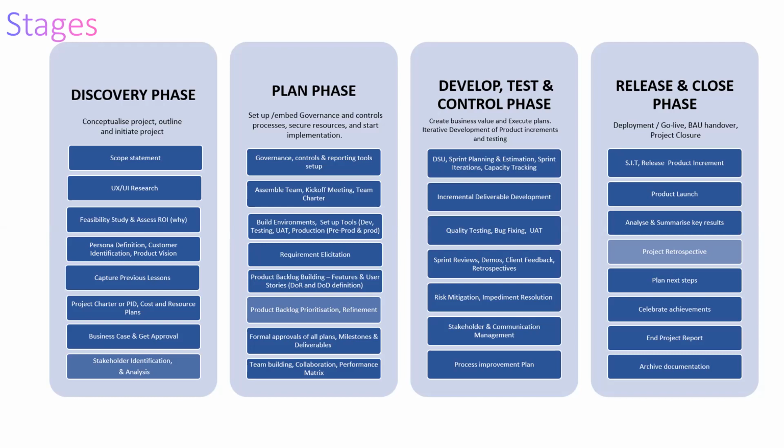Is it after your UAT that you will do SIT testing, guys? Do we do UAT after we've done system integration testing? We're supposed to do system integration testing and then do our UAT, isn't it? So something we can change then. We can change that.